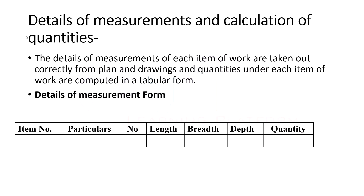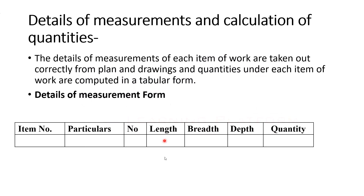The tabular form should consist of: item number; particulars, meaning the type of work to be done such as excavation or erecting a column; number, such as how many columns or walls; length of the activity — for excavation, the length of excavation; for a wall, the length of the wall; breadth; and depth. The quantity is obtained by multiplying number × length × breadth × depth.